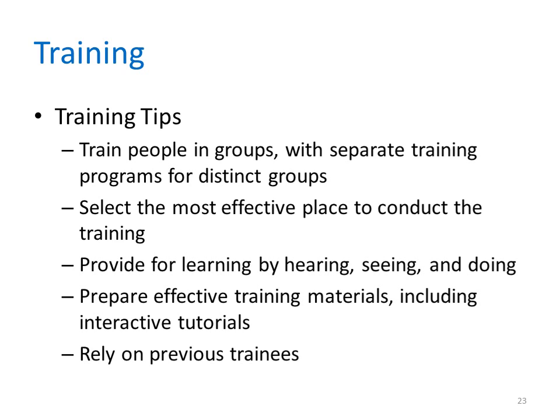And rely on your previous trainees. After one group of users has been trained, they can assist the others. Users often learn more quickly from coworkers who share common experiences and job responsibilities. Using a train-the-trainer strategy, you can select knowledgeable users who will then conduct training sessions for others.